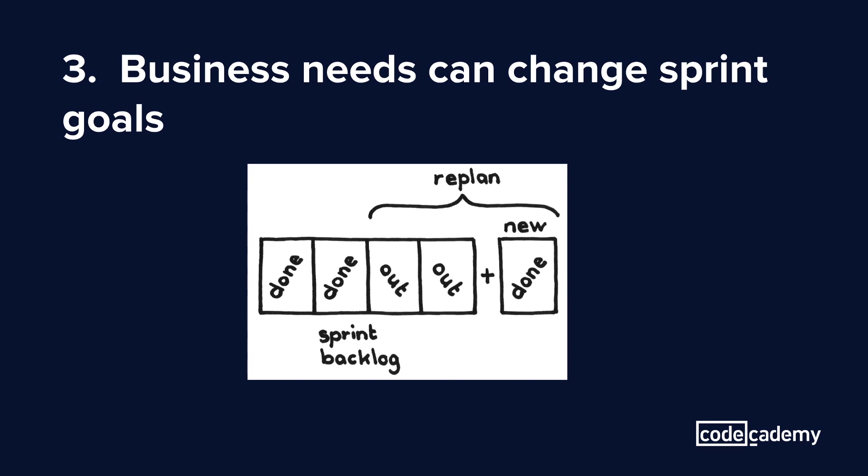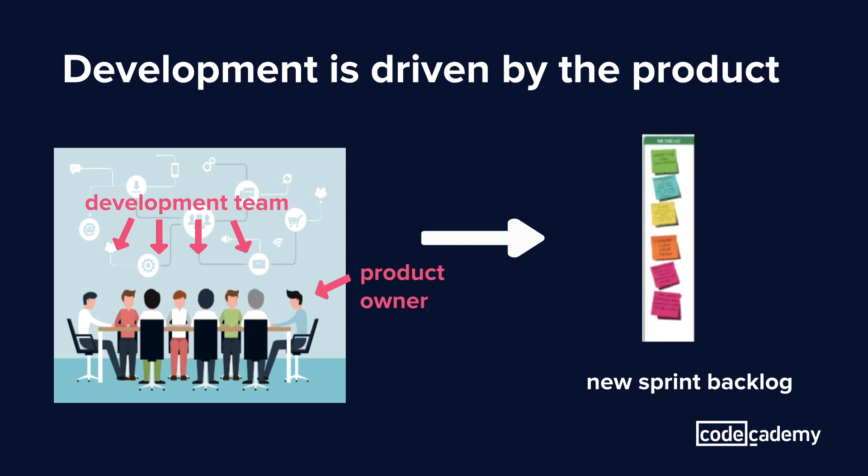There may also be times when your business needs change in the middle of your sprint and make your sprint goals obsolete. It might throw off the time estimates for the rest of the sprint, but that's okay. Sprints are just a way to shape and organize development work. Depending on how the new business needs change the goals of the sprint, the product owner can meet with the developers to create new tasks to complete, or developers can pull tasks from their own backlog and work on reducing technical debt. But at the end of the day, your product's needs should drive development.